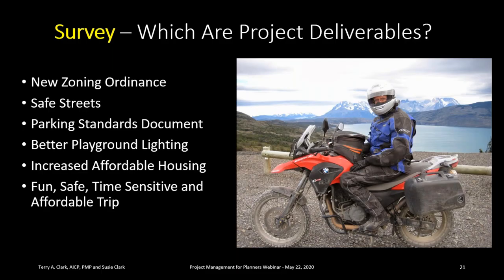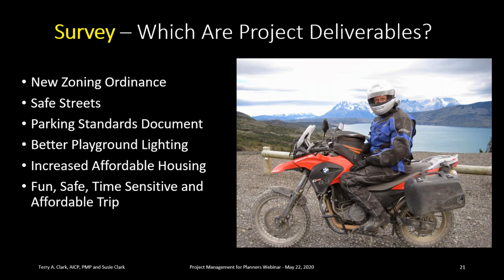Starting at the top: new zoning ordinance — well over three-quarters of you picked that, which is great. That is a final output — a deliverable with a beginning and end, and you know when you'll produce it. Safe streets is not a deliverable — you don't know when you have safe streets or how safe they are. Parking standards — yes, that's a deliverable. Better playground lighting — no, what's 'better' and when do you know you're done? Increased affordable housing — no, it's an outcome. Fun, safe, time-sensitive, and affordable trip — yes! That gets across the concept of deliverables.